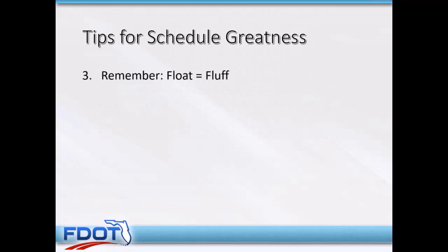Remember that float is equal to fluff. And remember that the schedule stew has many chefs, not just the project manager. There's the people reviewing, there's the people acquiring right-of-way, there's people clearing utilities, people getting environmental permits. All these people have to report to the schedule when they think things are going to happen.